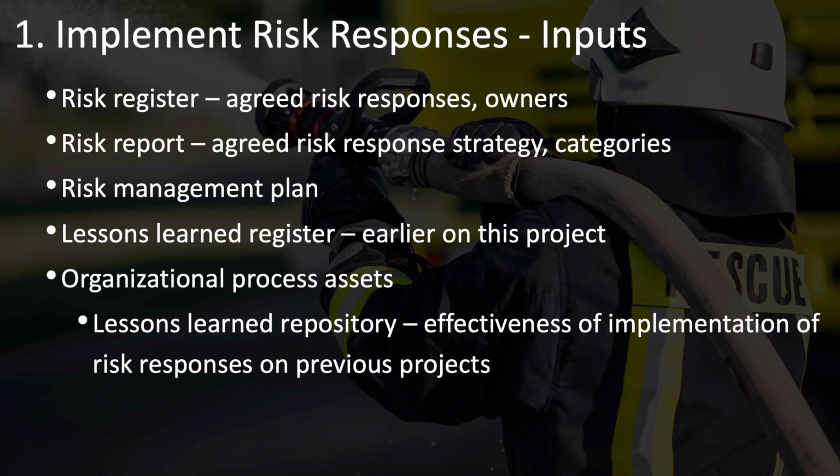responses. But you're also responsible for implementing the agreed risk response strategy for your overall project risk, which comes from your risk report. This risk report also will include highlights and categorization and analysis and trending of individual project risks that are considered high priority, as well as perhaps all of the significant risks analyzed in the aggregate, taking a look at how many different types of risks are in different categories and so on.